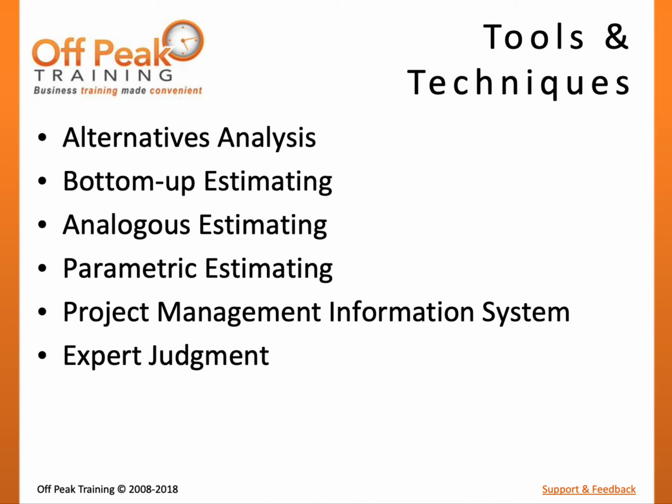Bottom-up estimating is a technique to break down each schedule activity into more detail for the purposes of estimating, then rolling the components back up to the activity level. This is similar to decomposition. However, the added detail is only used on a temporary basis for estimation.